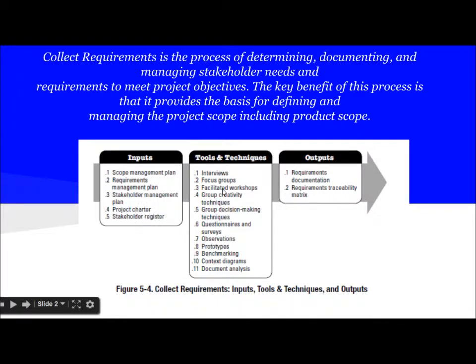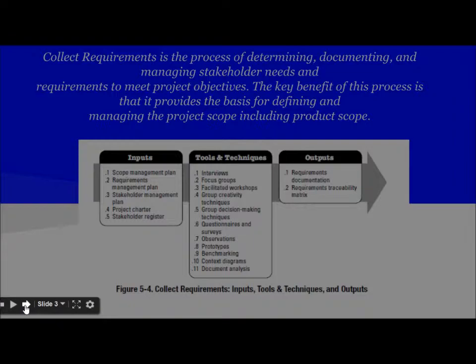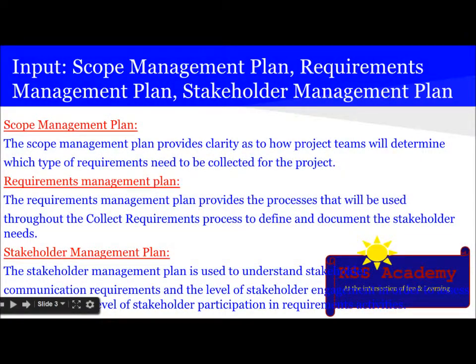Tools and techniques used are interviews, focus groups, facilitated workshops, group creativity techniques, group decision making techniques, questionnaires and surveys, observations, prototypes, benchmarking, context diagrams, document analysis. And the outputs are requirement documentation and requirement traceability matrix. Let's see one by one.